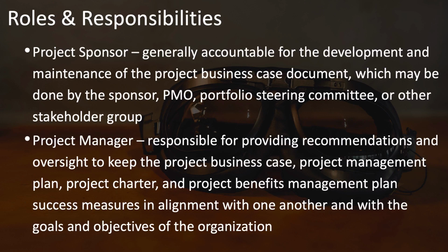The project manager, though not accountable for the project business case, is responsible for what? For providing specific recommendations and oversight to make sure these various documents that control the direction of the project stay in alignment with each other and with the strategic and other objectives of the organization. So the project manager is very involved, though not accountable for this document.